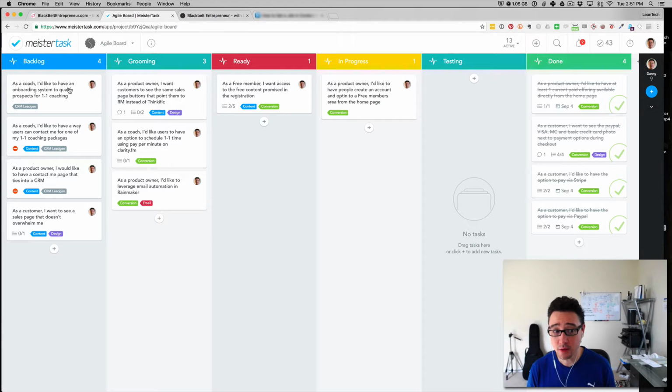Real quick, a crash course on Agile and stories. A story is just a quick explanation of who's requesting the feature, what functionality is being requested, and I like to throw in the why. What is it going to do? How's it going to benefit either the site owner, who is the product owner, or the customer, or improve the user experience? What's the benefit in it, right? That's all written in each one of these little rectangles, which are called stories.